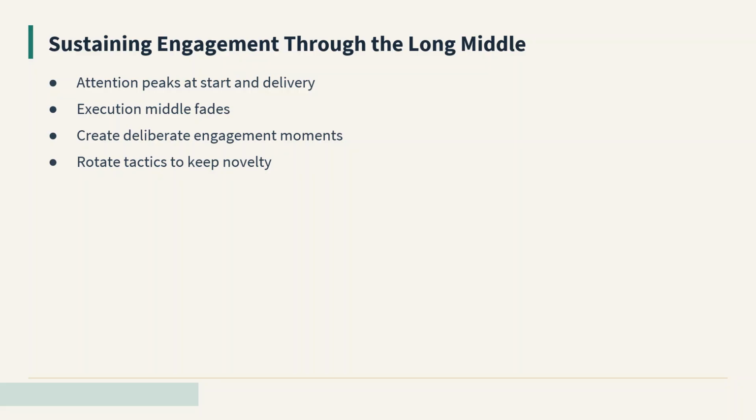If you have been sending written reports for 2 months, replace one with a 15-minute live walkthrough. If meetings have become rote, replace one with a working session where a real decision is made. Novelty recaptures attention and signals the project is still alive.